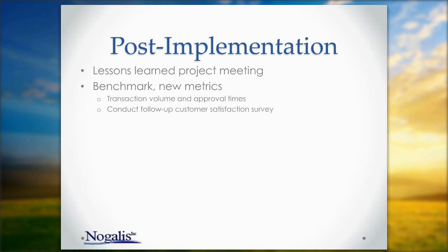In the post-implementation, discuss lessons learned. Make sure to end the project with a lessons learned meeting. What worked well? What would we change if we had to do over again? How should the charter have been written? And what would be useful in the next project?